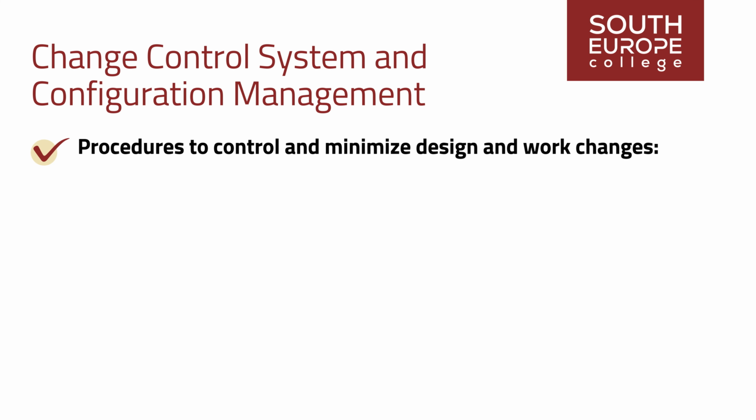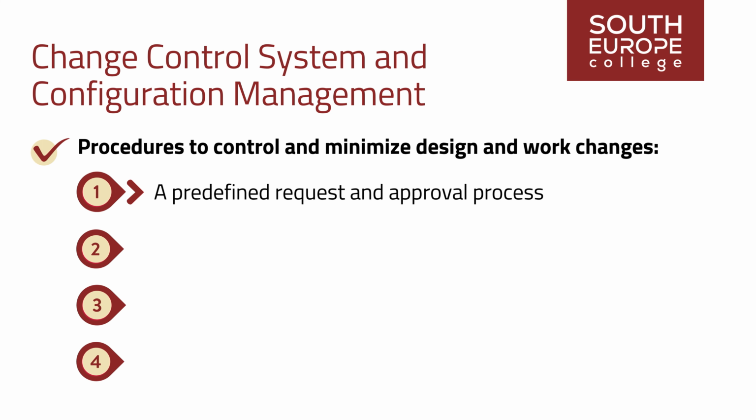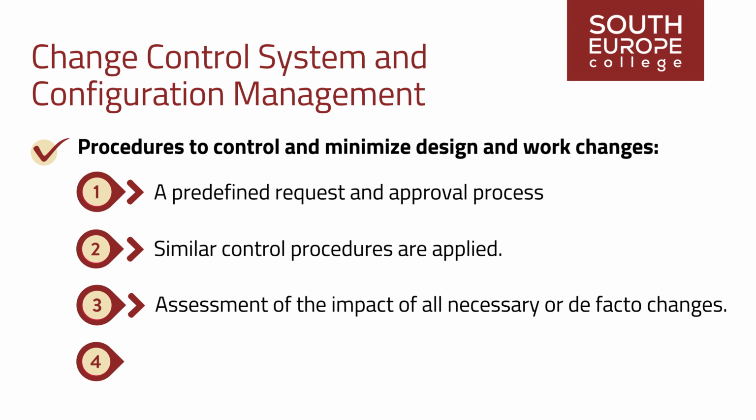Procedures to control and minimize design and work changes. A predefined request and approval process for all discretionary changes. Similar control procedures are applied to all subcontractors and suppliers for all purchase orders and test requests. Assessment of the impact of all necessary or de facto changes on the end item and project, leading to revisions of designs and plans to reflect the effect.